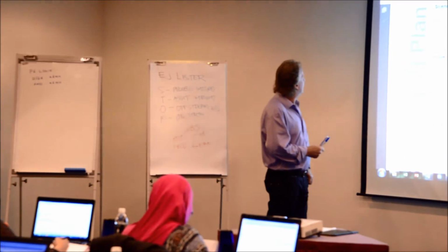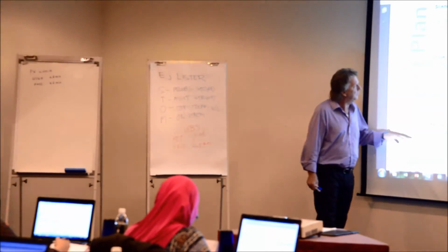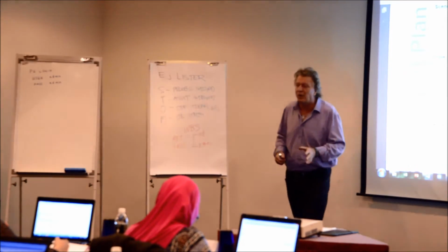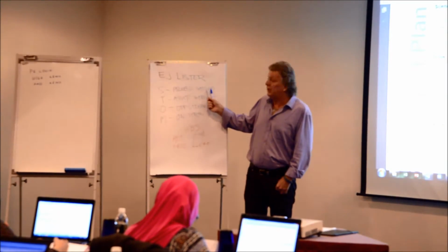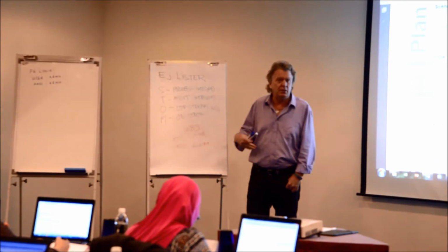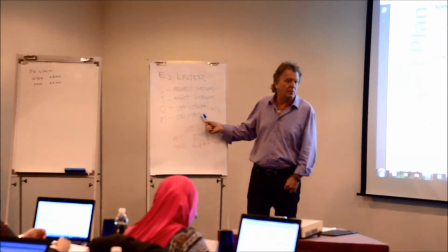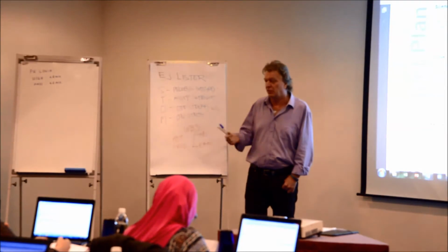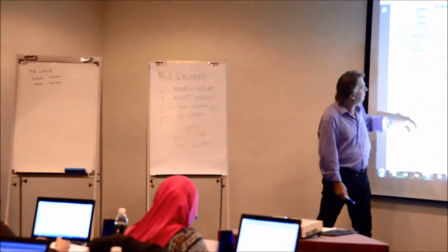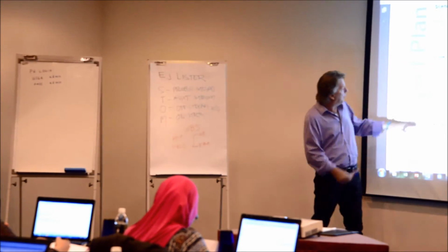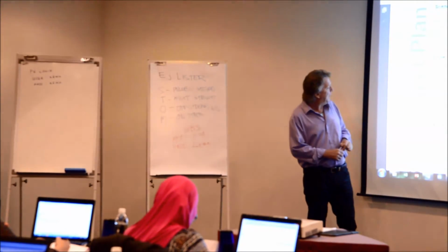So let me show you a little bit about this particular training. It's going to be high level, but we're going to be working on a turnaround where the primary idea is to do asset integrity inspection. We'll also be doing cleaning, because when we do a turnaround, we always clean. We always replace catalyst if we need to, replacing filter. And we're going to be doing some maintenance work that we need to work on equipment until the next turnaround. And that will be a combination of the stationary work, so all of the piping and valves and filters, the reboiler. Rotating equipment will be the pumps and compressors, and then electrical instrumentation. So these are the primary categories of work.